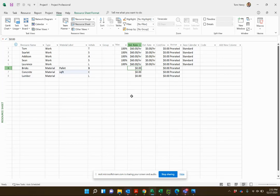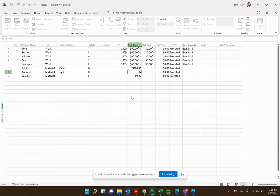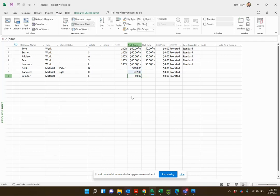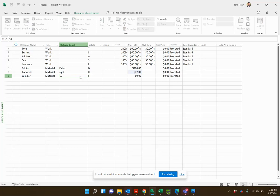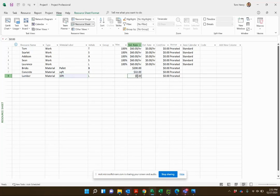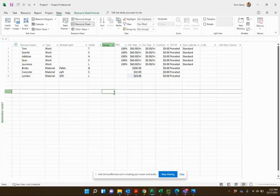What is the standard rate? How much do we pay for a pallet of bricks? Let's go with two hundred. How much do we pay for a square foot of concrete? Let's call it thirty two dollars. Lumber, we need to track our label, so lumber it's going to be just ten foot poles, and for each ten foot pole it's going to be twenty three dollars.